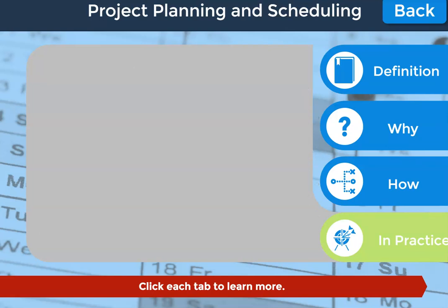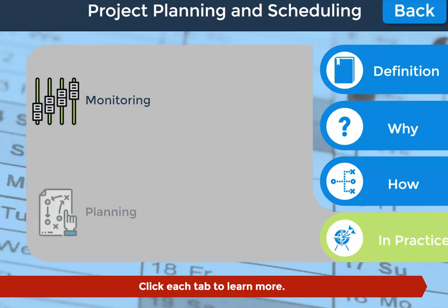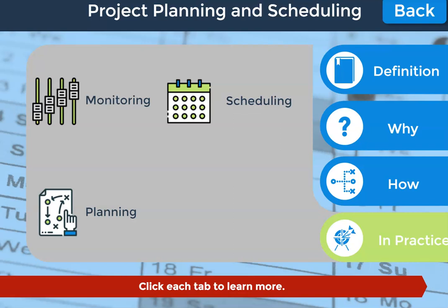Materials management is not just a concern during the monitoring stage in which construction is taking place. Decisions about material procurement may also be required during the initial planning and scheduling stages. For example, activities can be inserted in the project schedule to represent purchasing of major items such as elevators for buildings. The availability of materials may greatly influence the schedule in projects with a fast track or very tight time schedule. Sufficient time for obtaining the necessary materials must be allowed. In some cases, more expensive suppliers or shippers may be employed to save time.